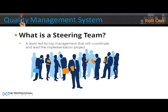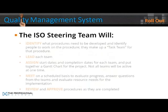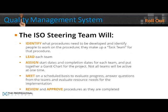What is a steering team? It's the team led by top management that will coordinate and lead the implementation project. The ISO steering team will identify what procedures need to be developed and identify people to work on each procedure — they make up the task team. They lead each team, assign start and completion dates, and put together a Gantt chart for the project. Not all teams will be active at one time. They meet on a scheduled basis to evaluate progress, answer questions from the teams, evaluate resources needed, and review and approve procedures as they are completed.